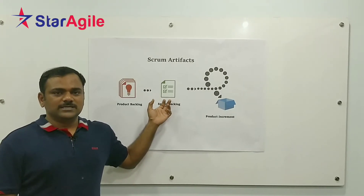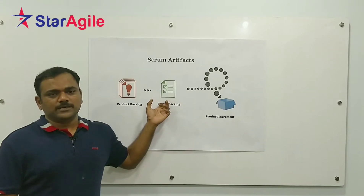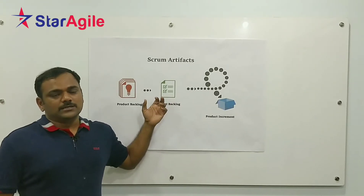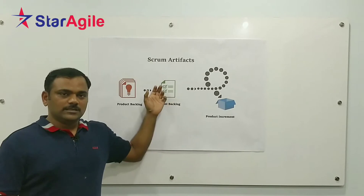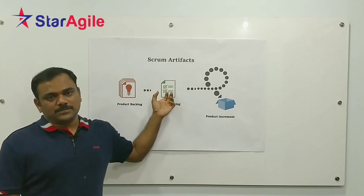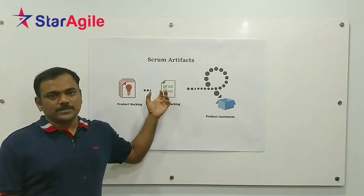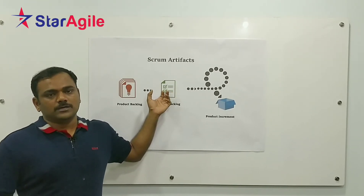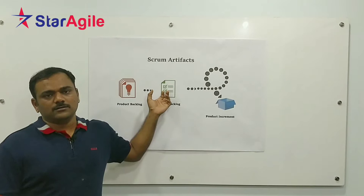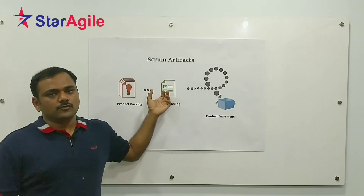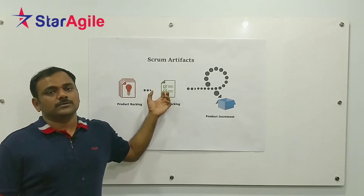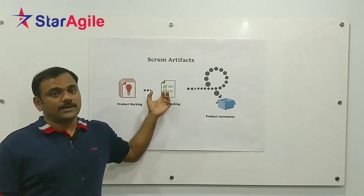The Sprint Backlog can change throughout the sprint, whereas the goal is fixed. How the team is going to achieve that goal can change. Part of the sprint backlog — the 'how' part — can change, and it's up to the development team to decide and do whatever is required to achieve the goal they built upon with the Product Owner during sprint planning.